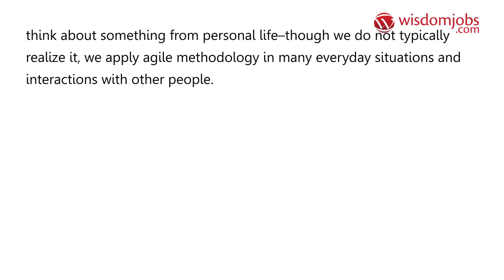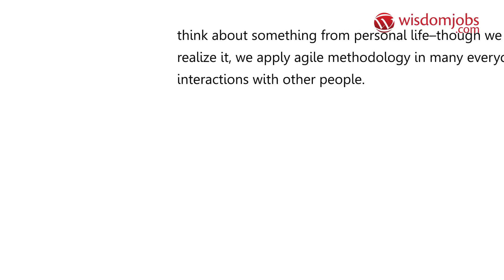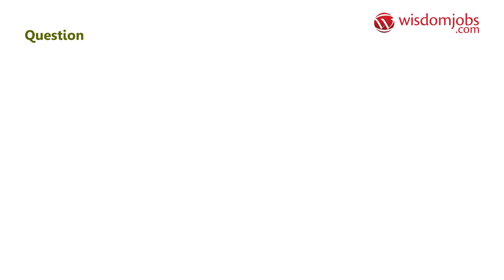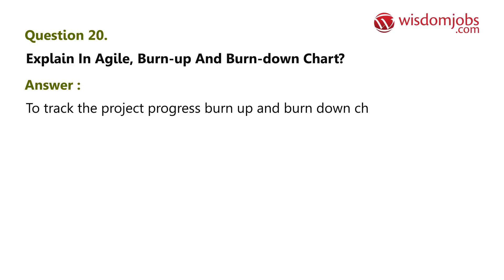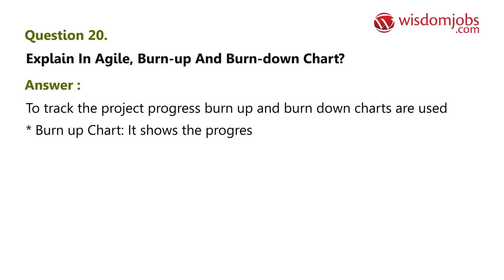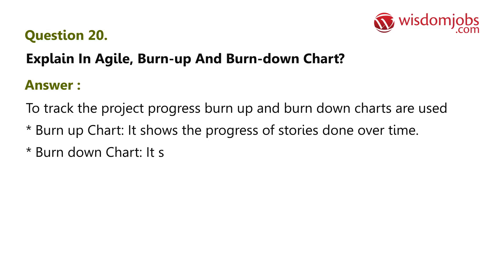Question 20: Explain burn-up and burn-down charts in agile. Answer: Burn-up and burn-down charts are used to track project progress. A burn-up chart shows the progress of stories done over time. A burn-down chart shows how much work was left to do over time.